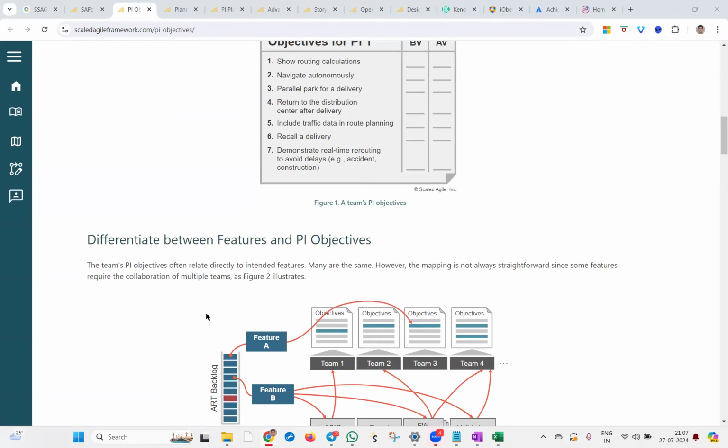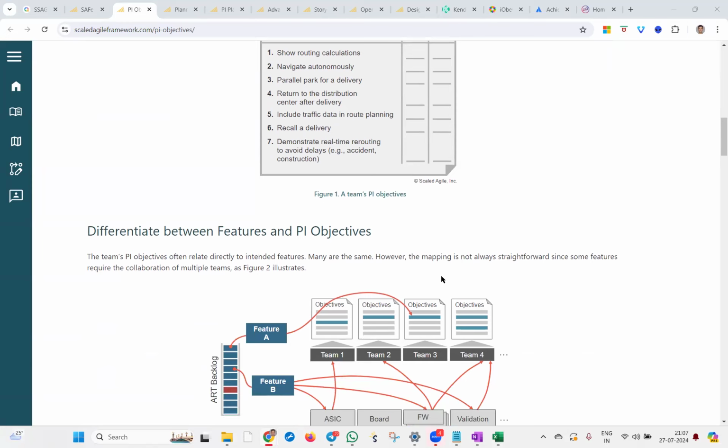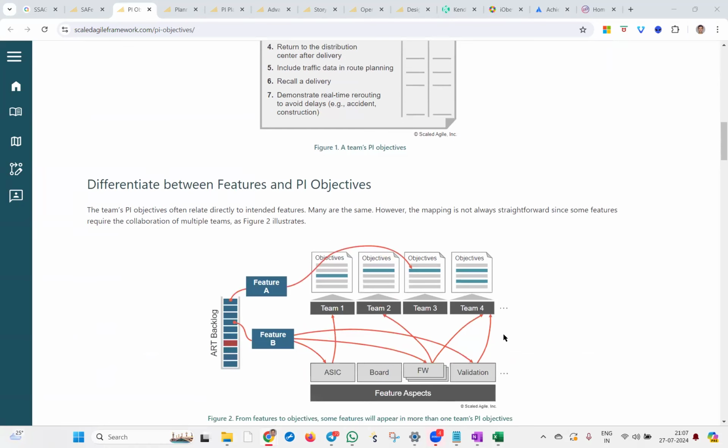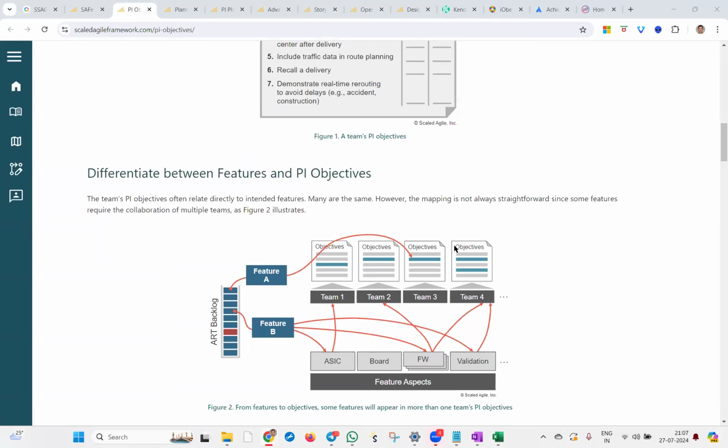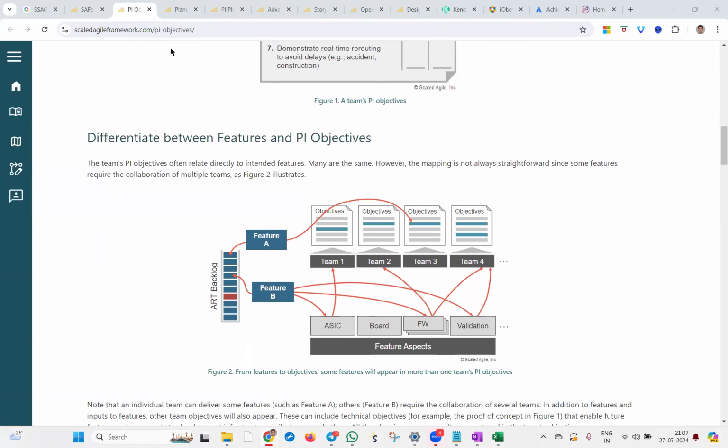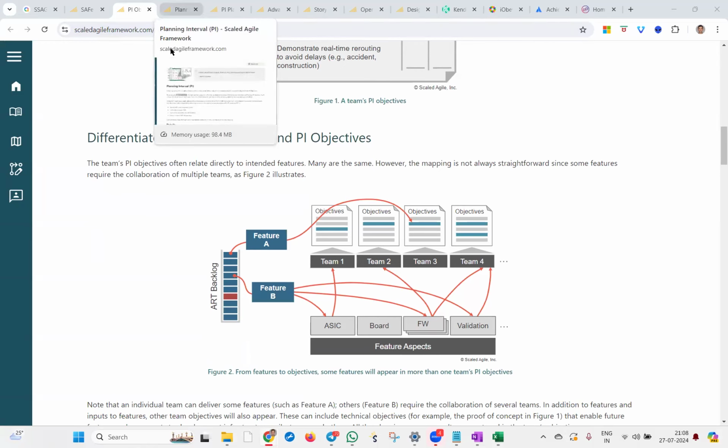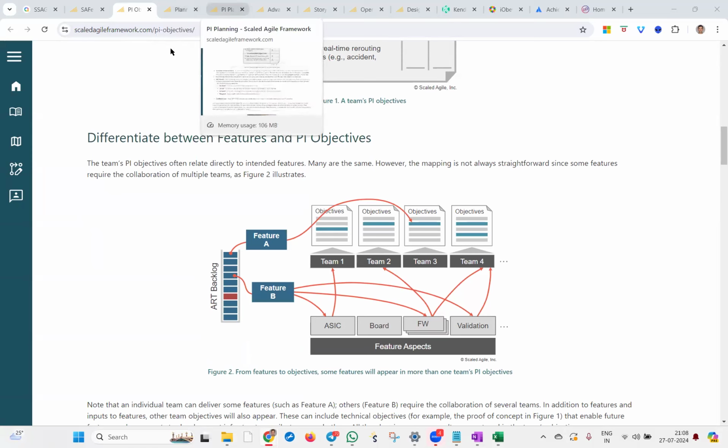Yes, so I would like to share one of the incidents which happened with my team. There was a lot of spillover from the previous PI because of the unavailability of a business owner. So we did the negotiation up to 60 to 65% of the delivery in our next PI. And for the risk and dependency part, we have a 4 quadrant of risk mitigation and acceptance. We put all those things in, and it was later accepted by the business owner. So this is what we did.